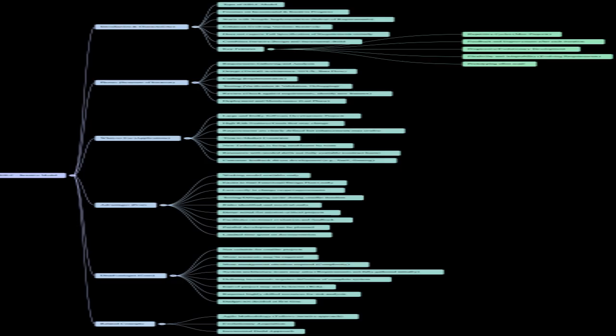And that focus must impact the bottom line too, right? In terms of cost. It absolutely does. It's generally significantly less costly to change the scope or the requirements compared to traditional models, like waterfall, where everything's supposed to be fixed up front. Here, you're almost expecting change, so the process is built to handle it more gracefully. Plus, progress is very clearly measurable at the end of each iteration. And because of the modular nature, you can often plan for parallel development streams, which can help speed up the overall timeline.